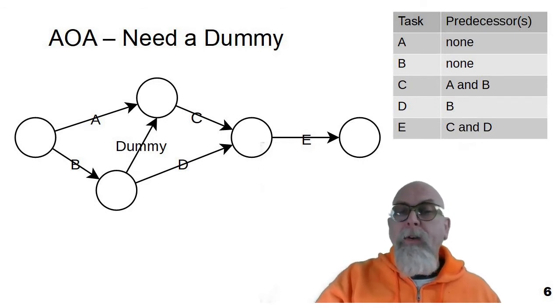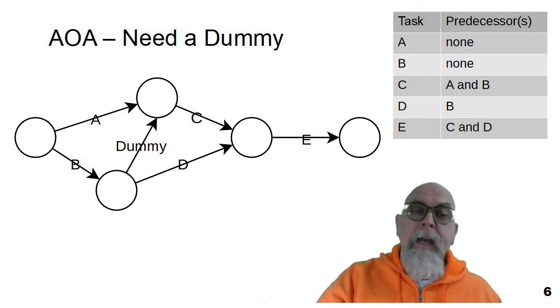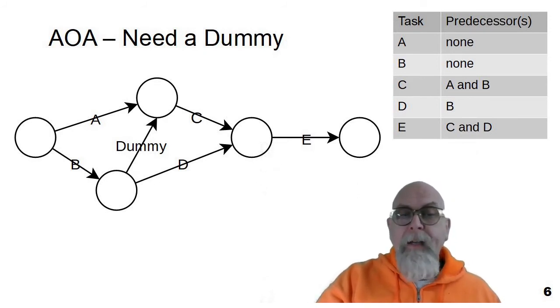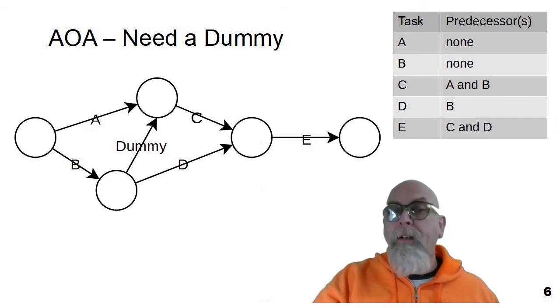And the reason why we couldn't combine just B over to the same node as A is because you can see that D is dependent upon B alone, but C is dependent upon A and B, and to model this, we needed to add the dummy activity or the dummy arrow to make this AOA diagram really represent the network as described above in the problem.